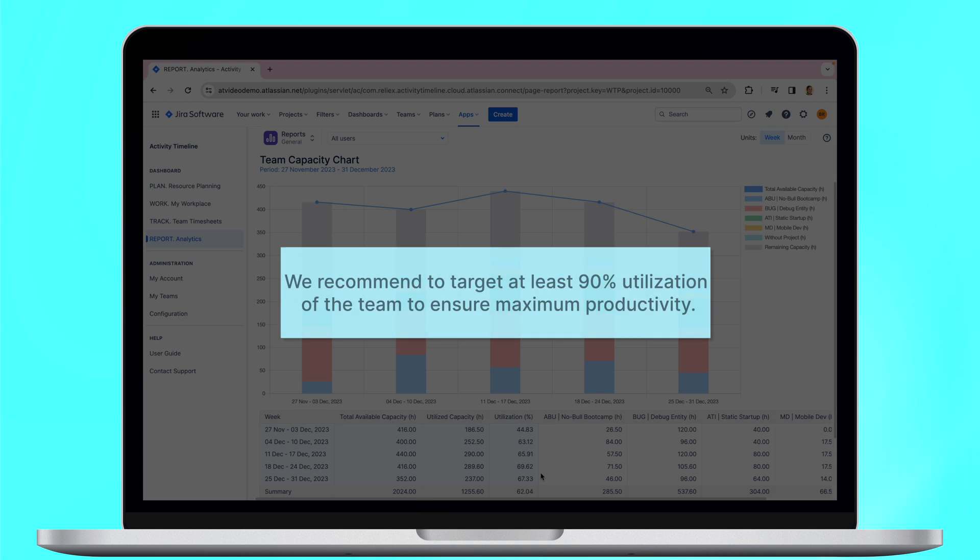Our recommendation is to target at least 90% utilization of the team to ensure maximum productivity.